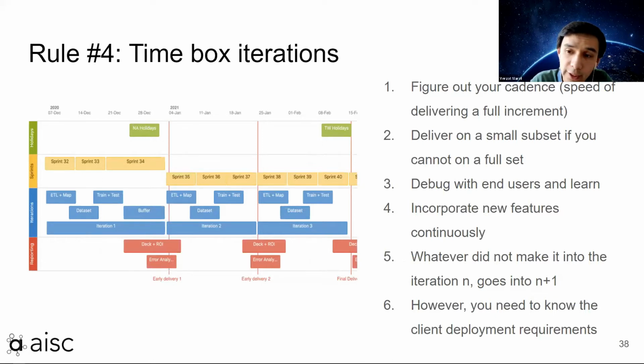In order to do that, there were several things that needed to happen. We agreed with the client that every 3 weeks we'll do a workshop and present the latest results. For that to happen, we had to have a small subset of data, so we took 100 samples from the client. We had training data for 3 years, but we didn't have outside validation data from the client, on a different year, that we didn't see.